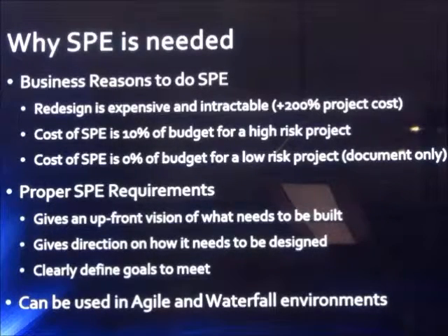SPE on a very, very high-risk project has been calculated across a number of tracked projects. In fact, we did one internally, we tracked it, it was high risk, we found real performance issues, we fixed them. 9.7% of the budget was spent on SPE. That lines right up with the 10% that's here, okay? It works. It's not an overbearing process.